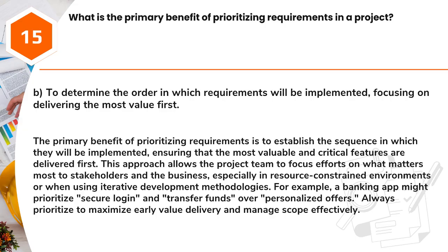This approach allows the project team to focus efforts on what matters most to stakeholders and the business, especially in resource-constrained environments or when using iterative development methodologies. For example, a banking app might prioritize secure login and transfer funds over personalized offers.